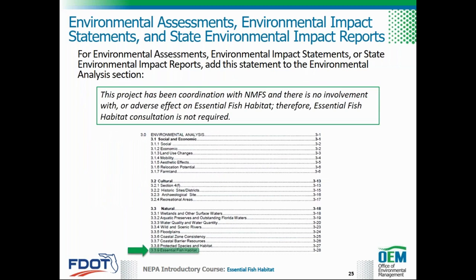For environmental assessments known as EAs, environmental impact statements known as EISs, or State Environmental Impact Reports known as SEIRs, add the statement to the environmental analysis section as appropriate. This project has been coordinated with NMFS and there is no involvement with or adverse effect on essential fish habitat. Therefore, essential fish habitat consultation is not required.